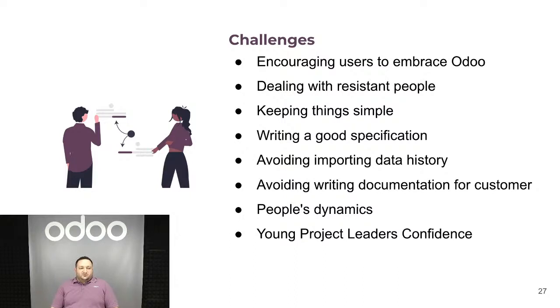What else? Avoid importing data history. So yeah, if it's historical data that adds no value, maybe not import it, because it's just gonna take some time and not gonna add a lot of value to your project. If it's something that they can have access to, so let's say it's a legacy system or it's a file that they can download somewhere and refer back to, then that's fine. You don't have to import it to Odoo.